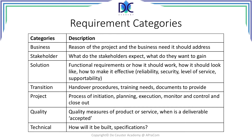Requirements related to the solution include functional requirements — reliability is very important, think about airplanes and the reliability of their components — as well as security (look at IT security), level of service, and all kinds of elements related to that specific solution we want to build. Requirements about transition cover what handover documents we have to create and what the training needs are — all these elements are typically completed at the end of the project and become very important during the closeout phase.